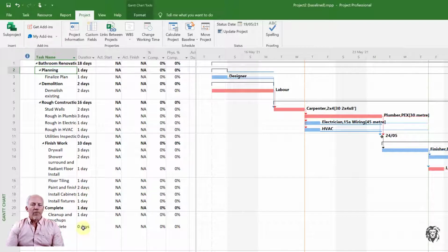So now we're going to go through and start to update our individual tasks. You see right off the bat, our status date, think of your status date as what date is it now, and I have to update everything up until now. It's probably recent but in the past, so that you have full visibility as to the status of your project as of that date. And so we have really 3 tasks which should have started by that status date. And so we're going to have to, as a minimum, deal with those specific tasks.